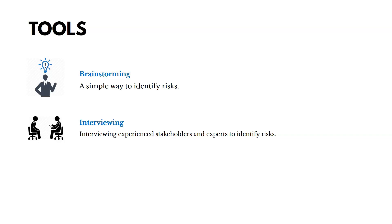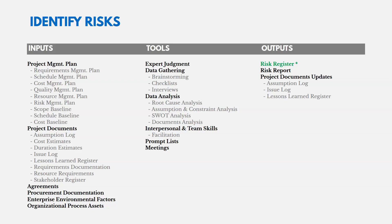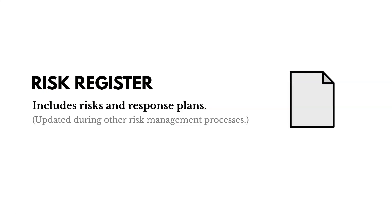Other techniques include brainstorming and interviewing experts to get feedback on what risks you could face. The key outputs are the risk register and a risk report. The risk register includes identified risks and response plans, and it's updated during other risk management processes as you analyze and determine how to respond to risks.